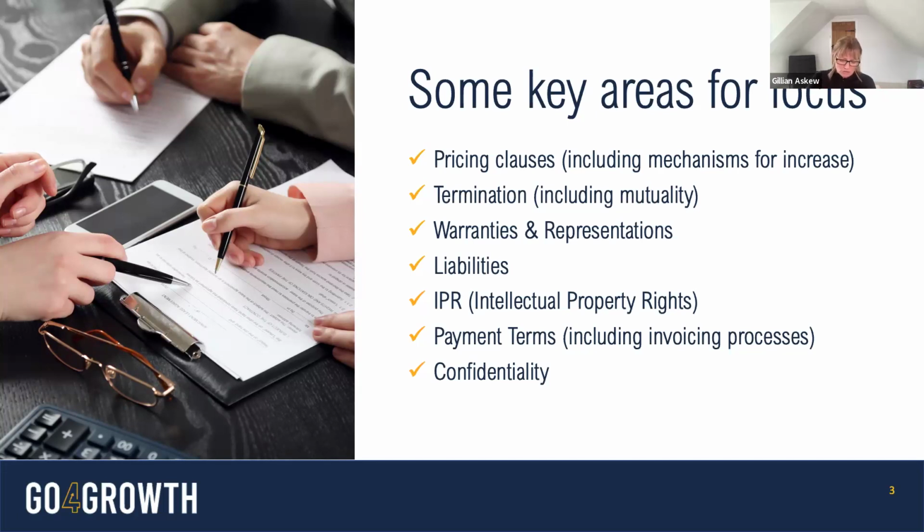And there's also something called termination for convenience. Termination for convenience would allow, and usually with a notice period, generally speaking, the customer to withdraw for any reason from the contract. So you might see in a set of contract terms and conditions that the customer can terminate the contract for any reason, giving you a 3-month notice period.